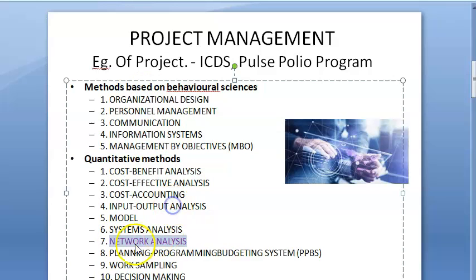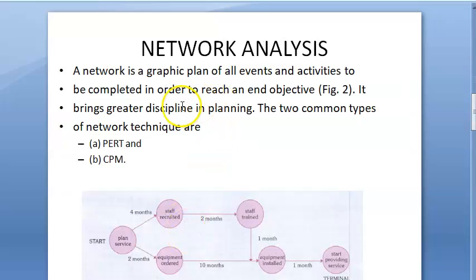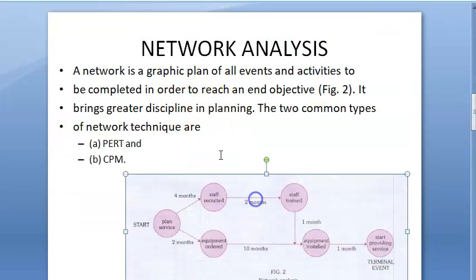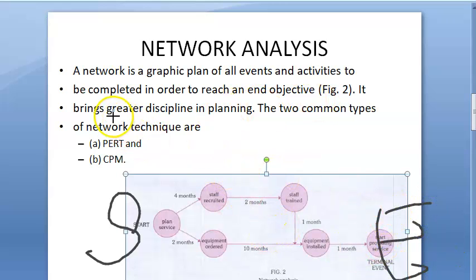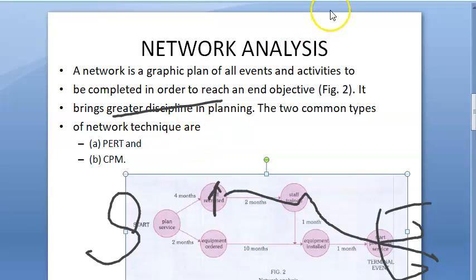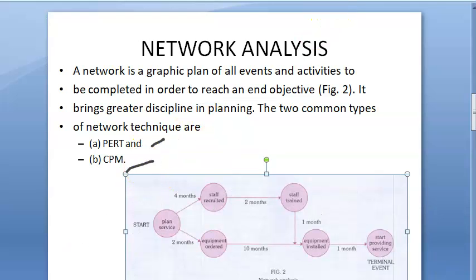So what is network analysis? You will make a network — a graphic plan of all the events and activities that you have to complete — in which order you will complete them to reach your end objective. It brings greater discipline in planning. There are two types of network technique: PERT and CPM.